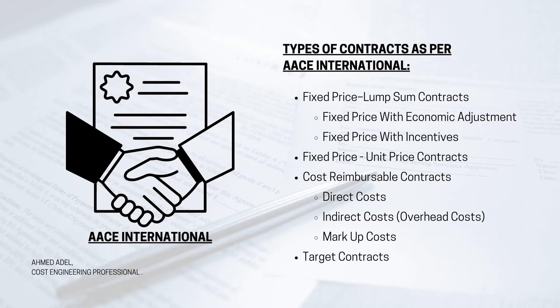A lump sum contract is one where we have drawings, specifications, and a bill of quantities, and the scope of work is very well defined. Someone can price the project and the agreement is made for that price — for example, 40 million to construct a building as per the drawings and specifications. As long as there are no changes to the scope, the contract price never changes.